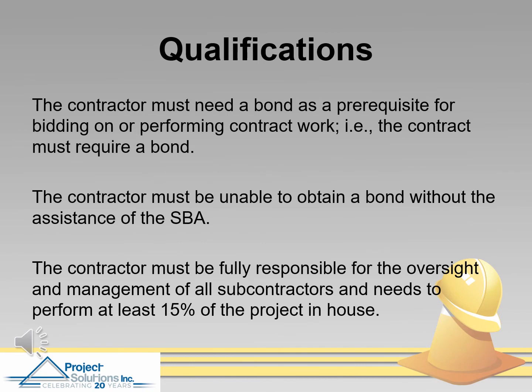There are a number of qualifications necessary for participation in this SBA program. First, the contractor must need a bond as a prerequisite for bidding on or performing the contract work. To say it another way, the contract must require a bond.